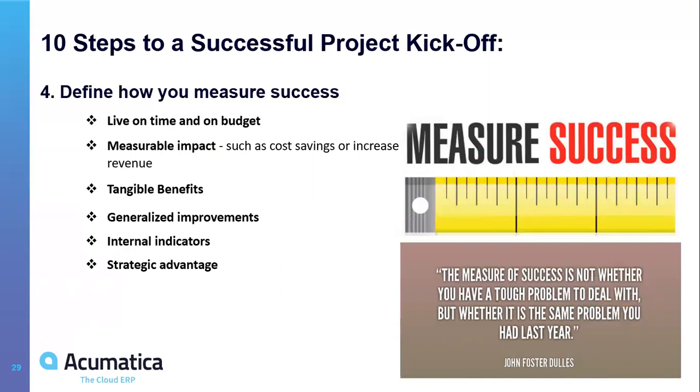going back to the example I had before, the project where they didn't do the UAT, they actually decided not to do the UAT because if they would have done it, they would not have gone live in time. And this is a very, very wrong decision. The decision should have been, we are doing the UAT and we are going live 2 weeks later. So it's not only being on time and on budget.